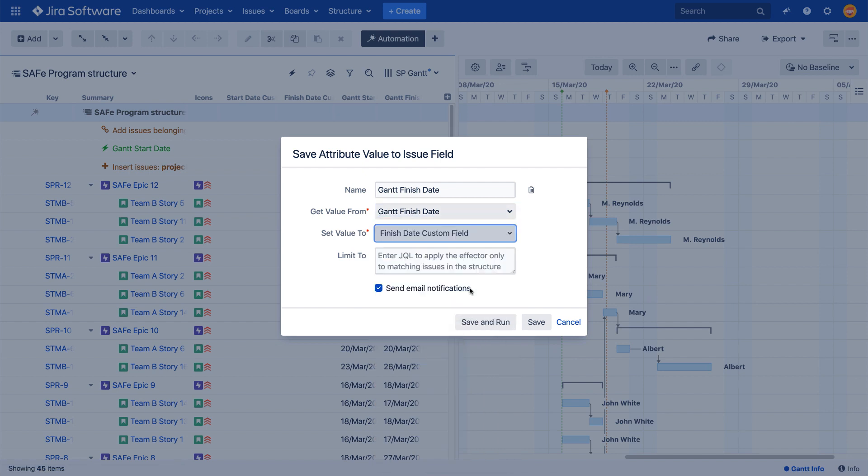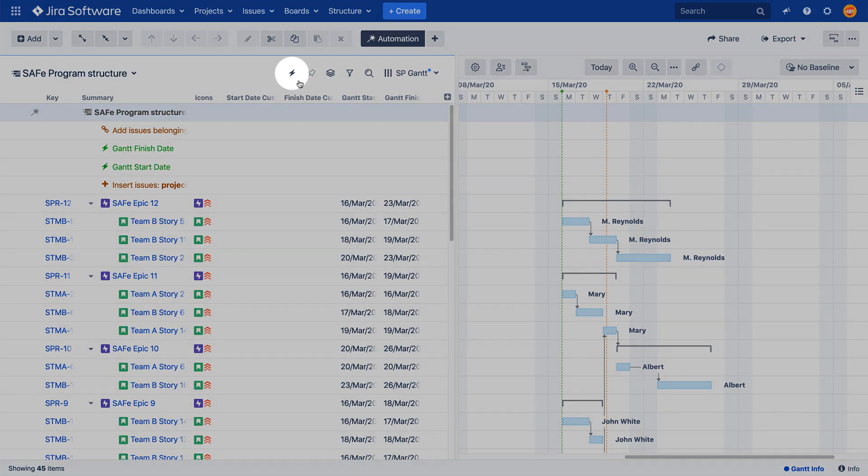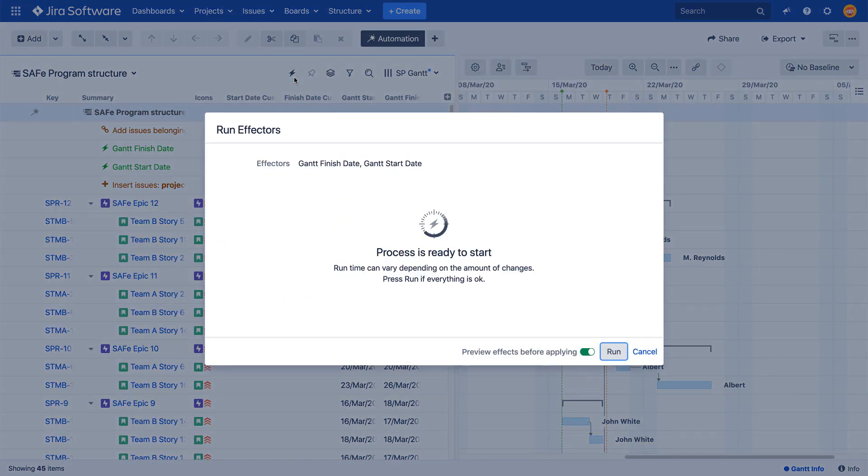As you've finished configuring each effector, you can run it individually by clicking Save and Run, or click Save and you can run both effectors together by clicking the Run all effectors button on the toolbar. In either case, you can select whether to review changes before they are applied to Jira or simply have all changes applied automatically.